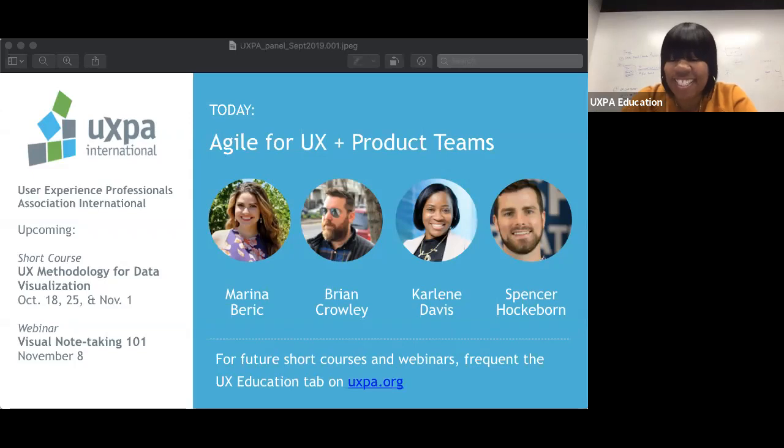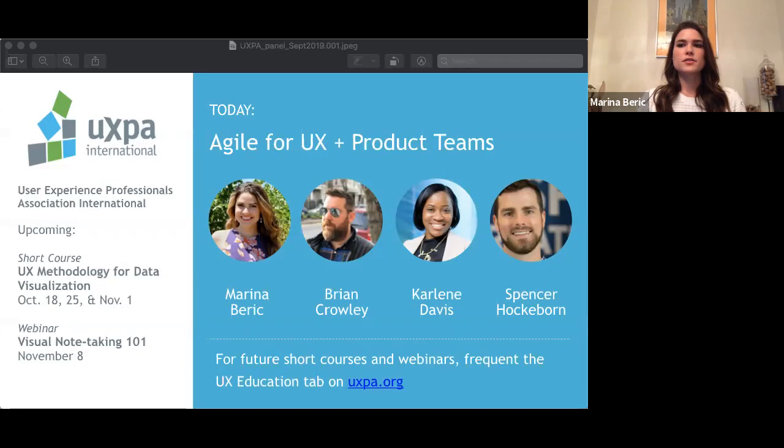Speaking really tactically about our process, this is more specific to my team and my platform and not necessarily representative of the larger organization. But currently, as a design lead, I oversee a number of project spaces. So on a quarterly basis, I'll meet with my product and tech stakeholders to do a quarterly portfolio plan. And that's where we take a look at what some people might call epics, but some people call big bets. We take a look at the priorities for our project areas, and we'll put them in writing, and we'll commit to delivering in project areas on a quarterly basis, not necessarily granular, and it will be a directive for product and tech and design.